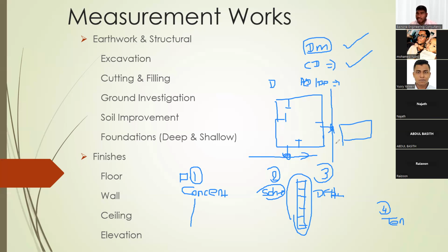So they will locate that you have a power source nearby this building. If there is no power, then you have to bring it from far away. So that will be addressed during this stage. This is the connection. This is not about your health and safety, or about your regulation to build. It's about your connection issues.